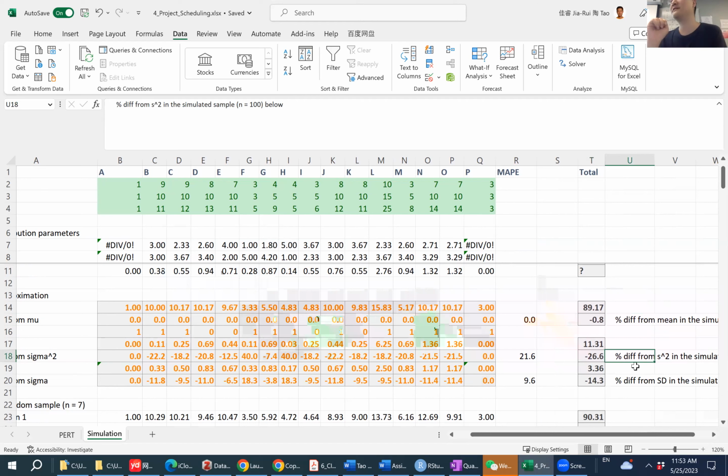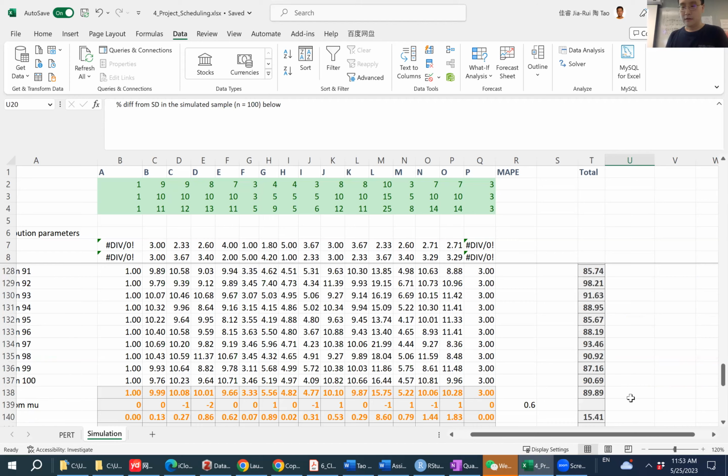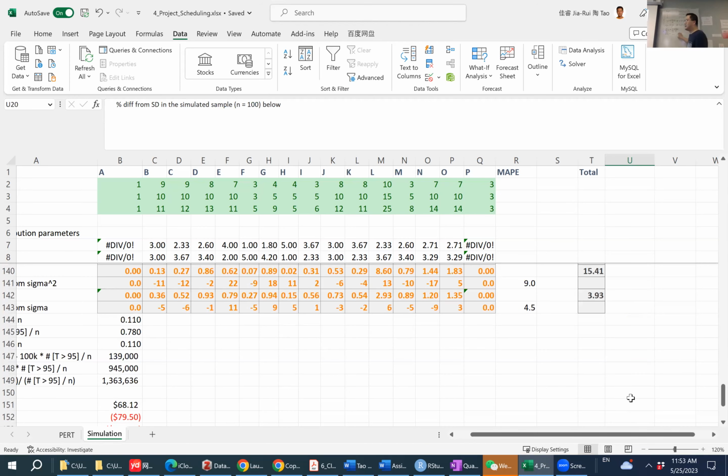Some other simulations would also find that the variance could differ by almost 50%. So if we use the Perl approximation, the variance is somewhat questionable. Because of that, the standard deviation could differ by almost 15%. If the variance is somewhat questionable, how can we still derive any uncertainty or probabilities if we cannot use the central limit theorem to depend on the normal distribution?